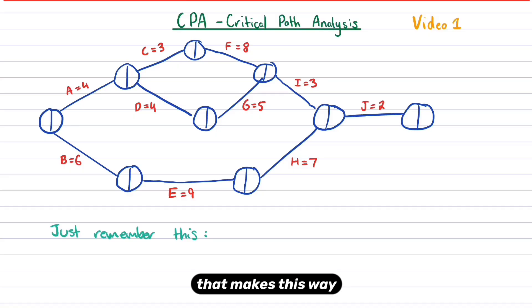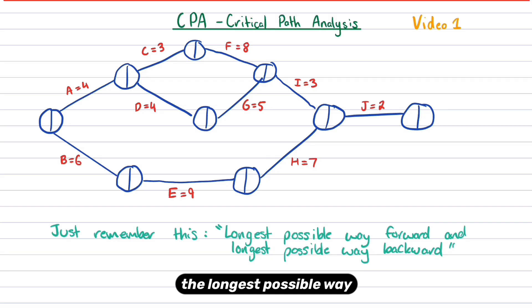I've figured out a way that makes this way easier to understand. So all you have to do, all you have to remember, ignore forward scanning, backward scanning, this and that. This is all you've got to remember. The longest possible way forward and the longest possible way backward.